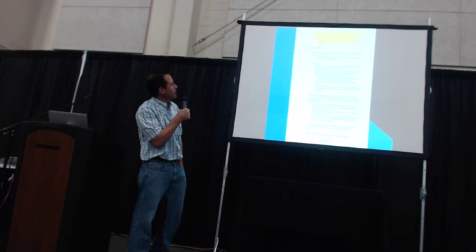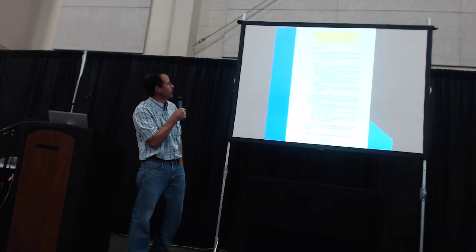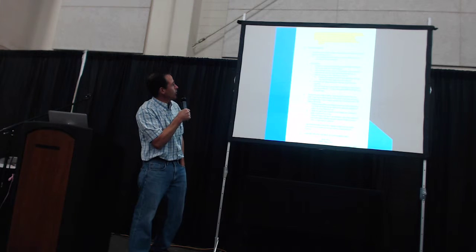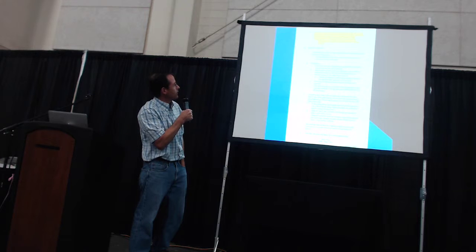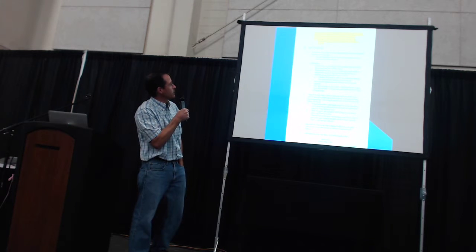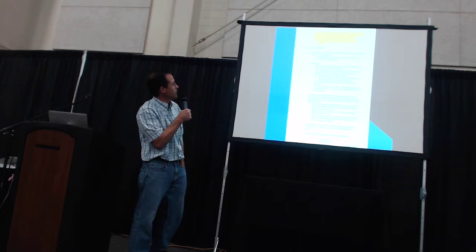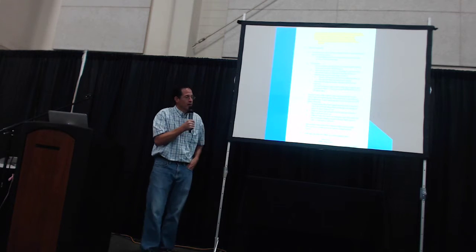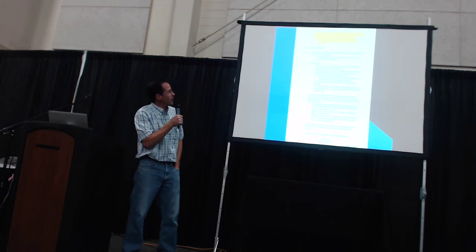Notify the engineer if any of the remaining piles in the foundation do not meet the established driving criteria before moving the hammer away from the abutment area or the bent area, or if driving conditions otherwise change. The department may require testing additional piles and reestablishing driving criteria for the remaining piles within the foundation. This is important.